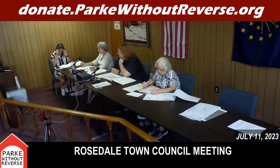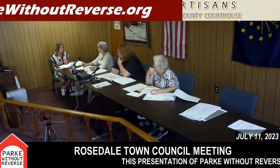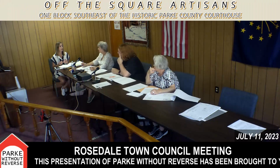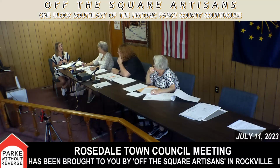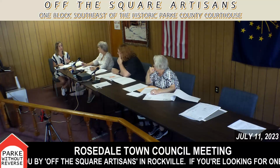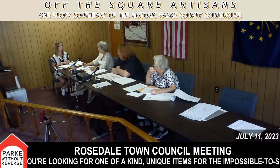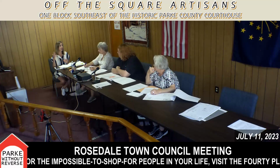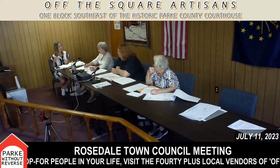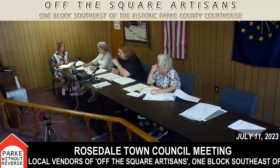Is a generator for that station something we should be looking at budgeting? I think that it would be extremely expensive to purchase one for there, and it will go for several days before it's full. And the better option for that, honestly, Gary suggested that we use Brad Barrett to vac out the sewer lines when we have a blockage. He can come and vac that out and pump it down to where it'll last even longer. Okay, so we've got a backup option. Yes. Okay, perfect.